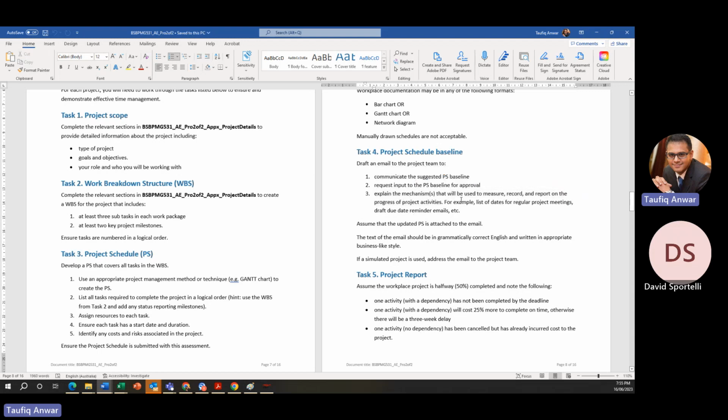You can say like we will be having weekly meetings or monthly reviews to see how the project is progressing. We will be measuring the earned values to understand what is the variance in terms of time, in terms of cost. Those will be recorded and updated to the management every month in the status update meeting with the management. However, for the team who are working in the project, we will be updating these figures and reviewing the project every week or every fortnight. That's up to you. You get my point?